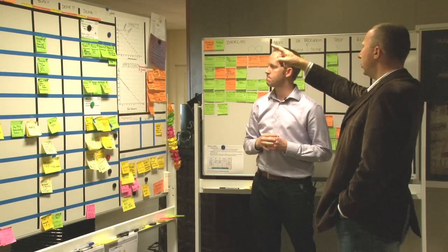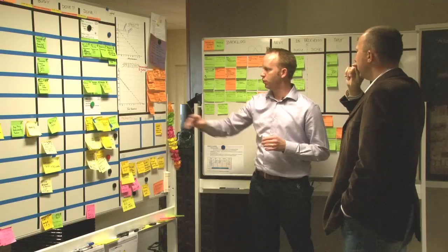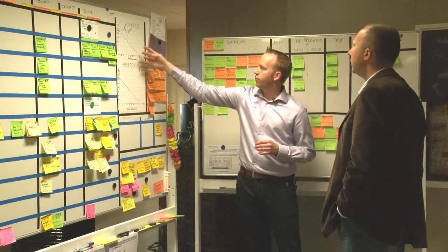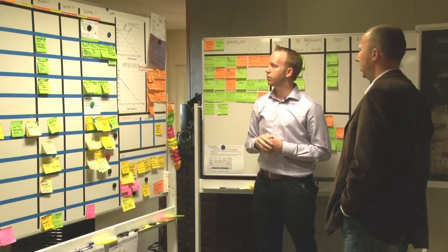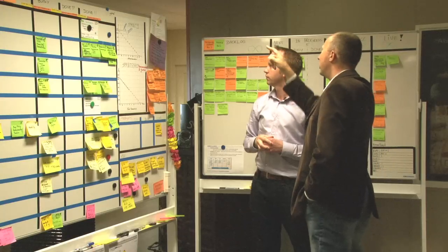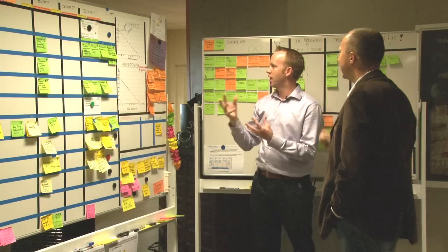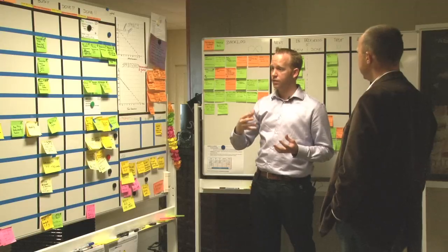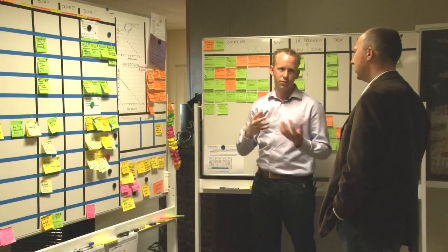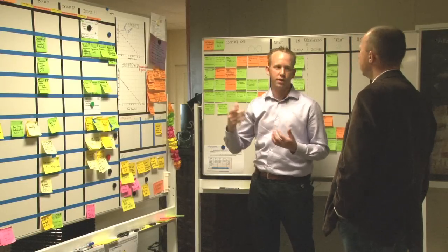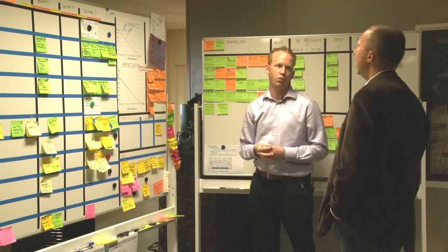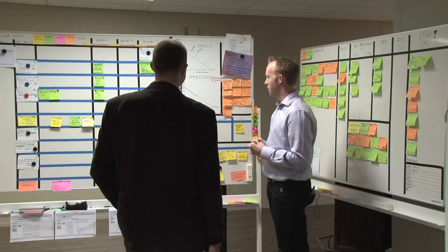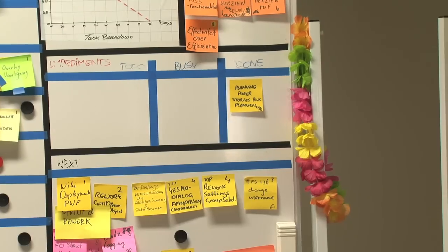Okay, and you burn two things, two products? No, we burn activity. And this is task hours remaining, what you see here. Yes. And above we burn results, story points delivered. And then the definition of done, and I see this in sprint done party, what's that? Yeah, that's in between activity we are trying out. When the product owner says it's done, then the team members show it to the other team members. Yes. We have a team of 9 people, so not everybody works on the same story. And this way they all know what's been worked on. Okay, so when the story is done and the product owner says it's okay, then you have a small party. We have a small party with cake and hats and scarves and drinks.